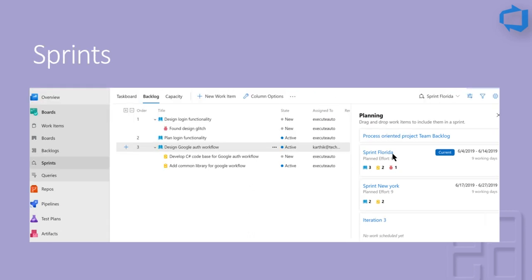And finally, sprints. Sprints is the place where we see all the different kinds of tasks which have been assigned to team members, and we also see the capacity, and we'll plan the sprint based upon the capacity we have and the velocity we have got, and what the story points are. And then we'll be taking the backlog item and discussing that. It is also very interesting to see the number of tasks that have been taken and started for this particular sprint to start working with it.